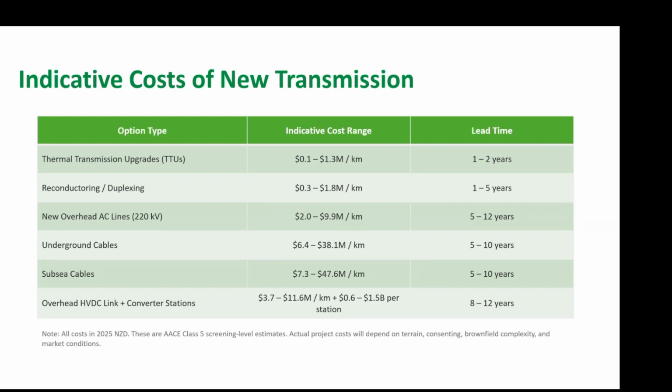But this approach did mean that we would have to make some assumptions around the quantities used in those models, and this was done as a top-down approach from existing asset information and other project scopes. An example would be we haven't done specific design work for a new transmission line. For any individual transmission line, we've used models from our existing projects and assets, and that allows us to scope and estimate many projects without having a large design resource, which is perfect for this long-term planning work. But as you can see, there is a bit of a trade-off for having that speed and ease when you're estimating, and that's the accuracy.